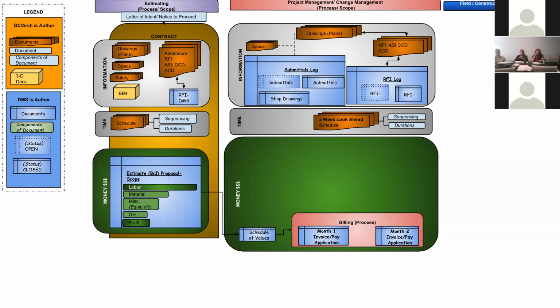What's also worth noting with project managers is that sometimes different projects, whether it be school projects or city projects, go on different billing cycles, which means that sometimes they go from the 15th to the 15th, some go from the 1st to the 1st, some go 30th to 30th, some go in 20-day cycles. They'll just say, you need to bill every 20-day cycle. So that process is usually in the contract and needs a level of focus to manage how money flows. That's what Brooke and Chelsea and I are focusing on, those components.